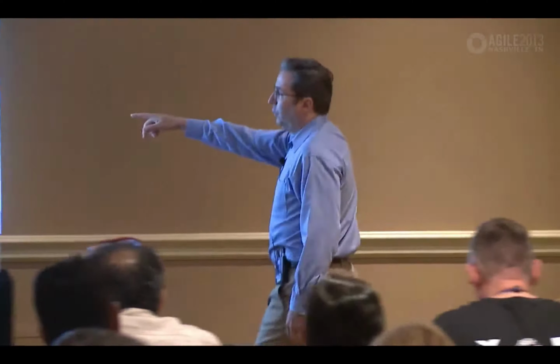In Agile, we favor long-lived teams. The economics favor keeping teams together for an extended period of time. If your company's attitude is that at the end of every project, we're going to blow away the current team and dynamically compose a new team for the next project, you'll lose the benefits of having people who have worked together and understand each other, trust each other, have their backs in a hot situation. You won't have that. Plus, you won't have any shared estimating history, any shared velocity, which will make planning a bit more difficult. So I want my teams to look like this.